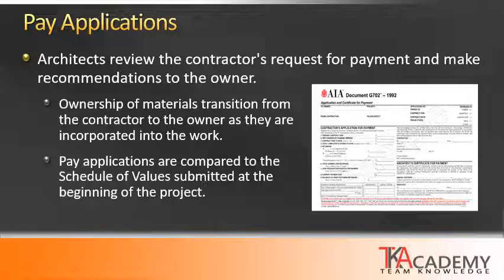So as the contractor is building the project, as the items are being put into place and installed, the pay application will pay for that certain percentage of that work that's been performed. Once the owner pays for that, it is now the ownership of the owner, no longer of the general contractor.